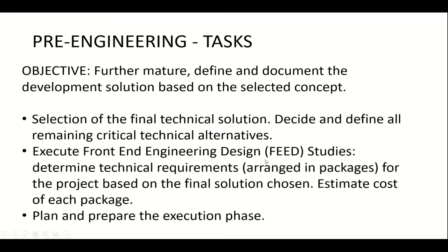And these are essentially based on starting to paint and come up with the system that I'm going to use. Then I start to determine the technical requirements I will need. For example, for the topside facilities, I decide, well, I need a system that can process this amount of crude, this amount of gas, this amount of water, and that the oil, gas and water will have the following properties.